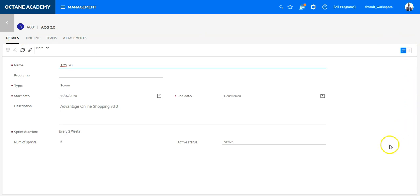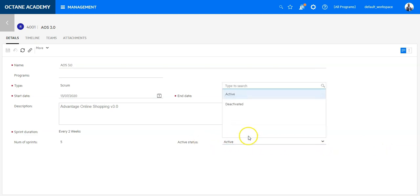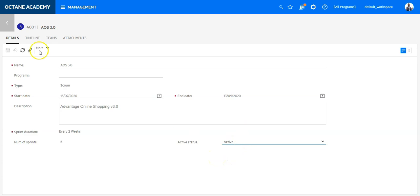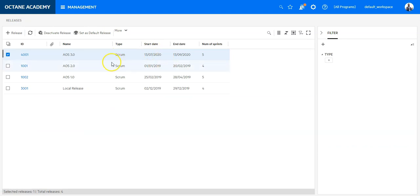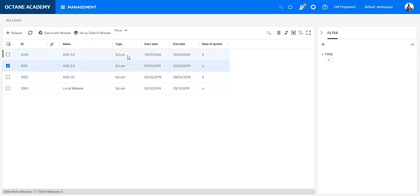Basically, that's it. There is a very important field, from my perspective—the active status. This is something you need to continuously manage. Once the release is over, you can say this is deactivated. This will allow you to really avoid execution of test cases on the wrong releases. Make sure the releases which are delivered are deactivated, and just make releases active only which you really need in your workspace. This helps a lot to manage the right data at the right place.